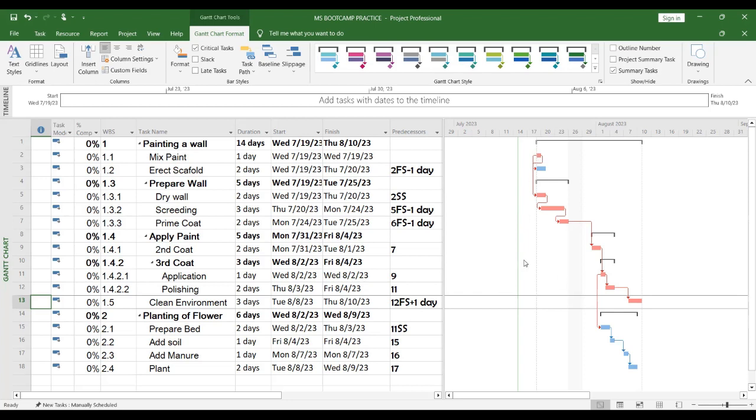So the summary of what I want to say is this. If you want to apply your lead, apply it on all these activities. If you apply it on the other activities, you're only taking risk for nothing. It doesn't add value to your project. If you spend money on the activities in blue, you have just wasted your money. If you want to spend good money and have value for your money, concentrate on the tasks that are highlighted right now. That is how to identify them.